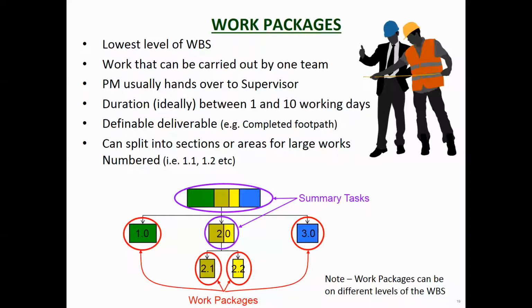If you're talking about a design package, for example, you might say to the electrical engineer, here's the pump specs and that sort of business. Here's the budget, here's the time, I want the full switchboard design by such and such a time. So you use work packages in construction and in design. And you can split it into sections for a large work.